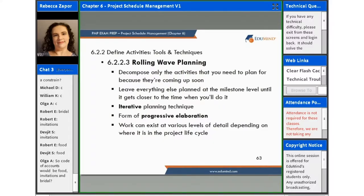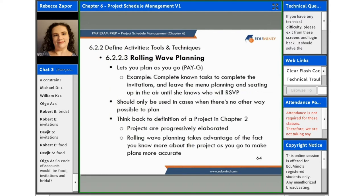Our next tool and technique is rolling wave planning, and this helps you to decompose only the activities that you need to plan for because they're coming up soon. You can imagine this would be used a lot in an adaptive type of environment. It leaves everything else planned at the milestone level until it gets closer to the time when you'll do it, and then that's when you get into the more granular detail. It is an iterative planning technique and a form of progressive elaboration, so work can exist at various levels of detail depending on where it is in the project lifecycle.